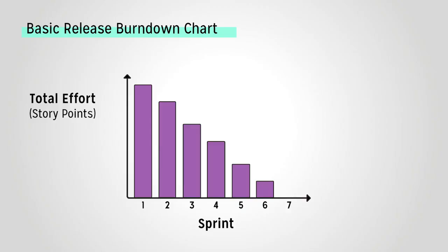Since a release burndown chart can show you all that information, you might be picturing a pretty complicated chart. But that's the beauty of a release burndown — it's a simple concept. Let's take a look at a basic release burndown chart. We have our sprints listed horizontally, and this project has 6 sprints. Vertically, we have the total effort, described with whatever measure your team has chosen — we're going to use story points in our examples.